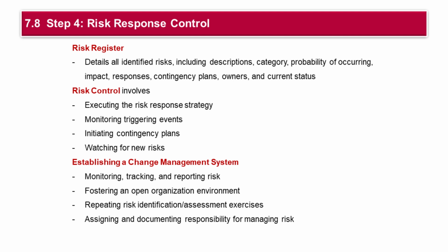This process includes identifying proposed changes, assessing their impact, formally reviewing and approving or disapproving them, resolving conflicts, communicating updates, assigning implementation responsibilities, and adjusting the master schedule and budget. Tracking these changes ensures they are properly managed and integrated into the project plan.